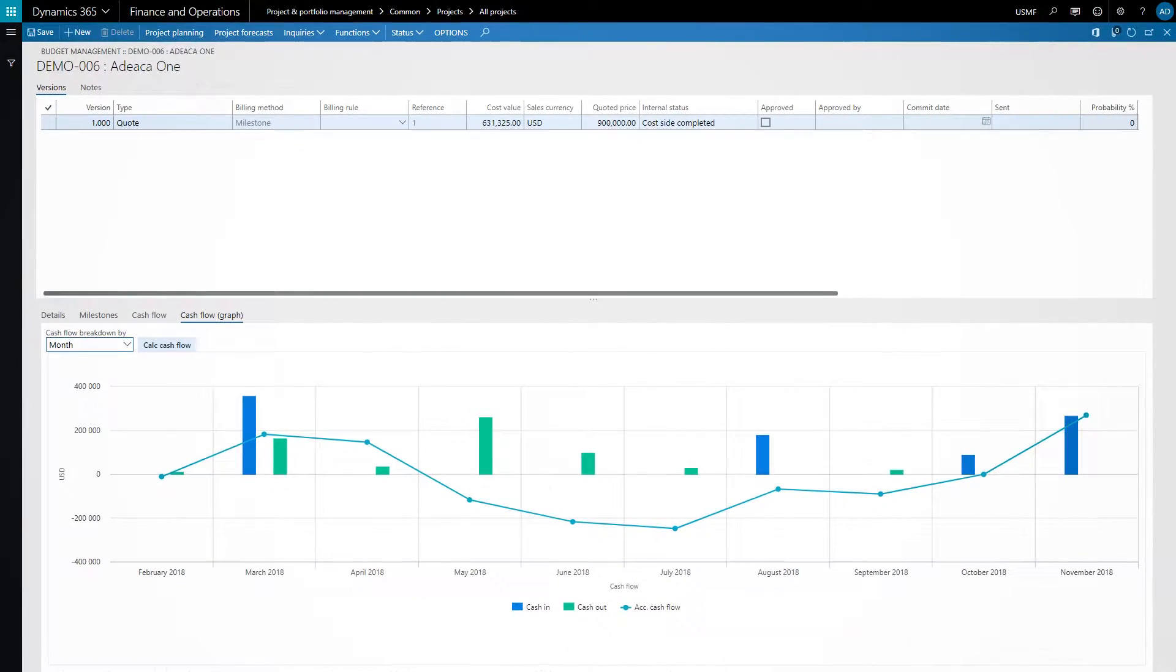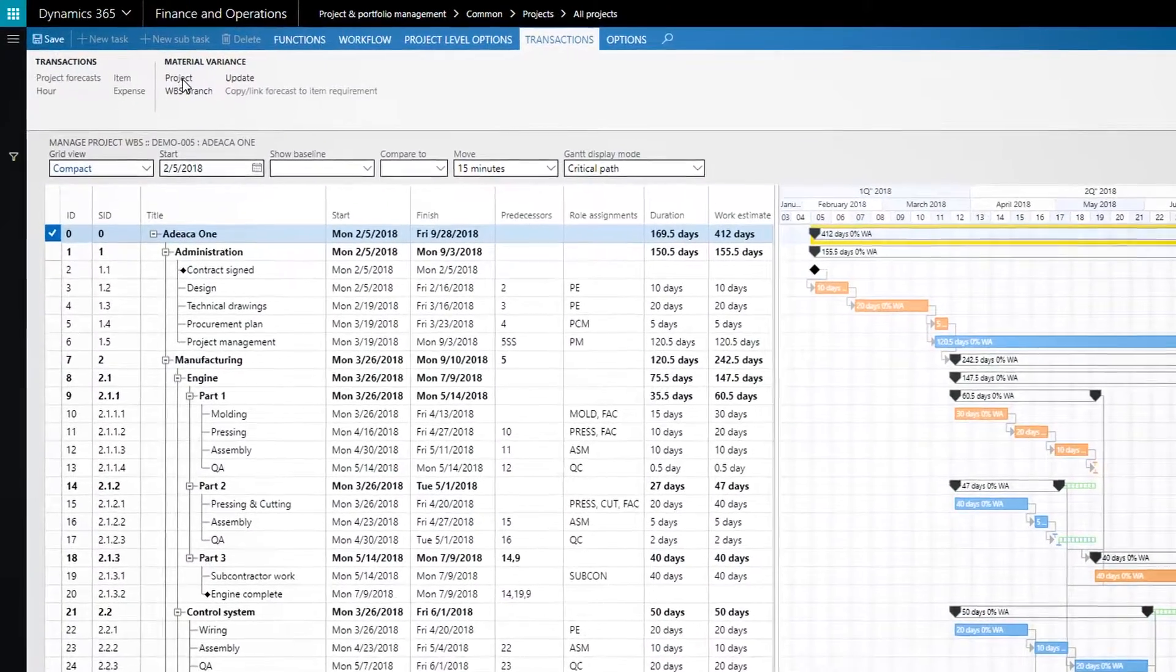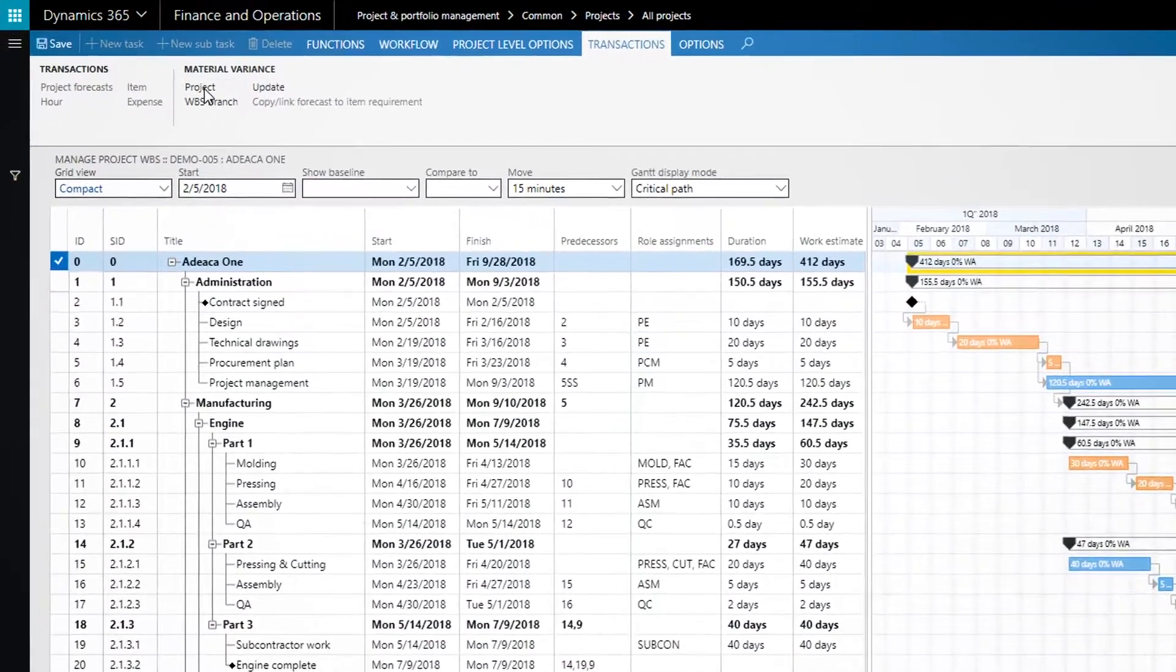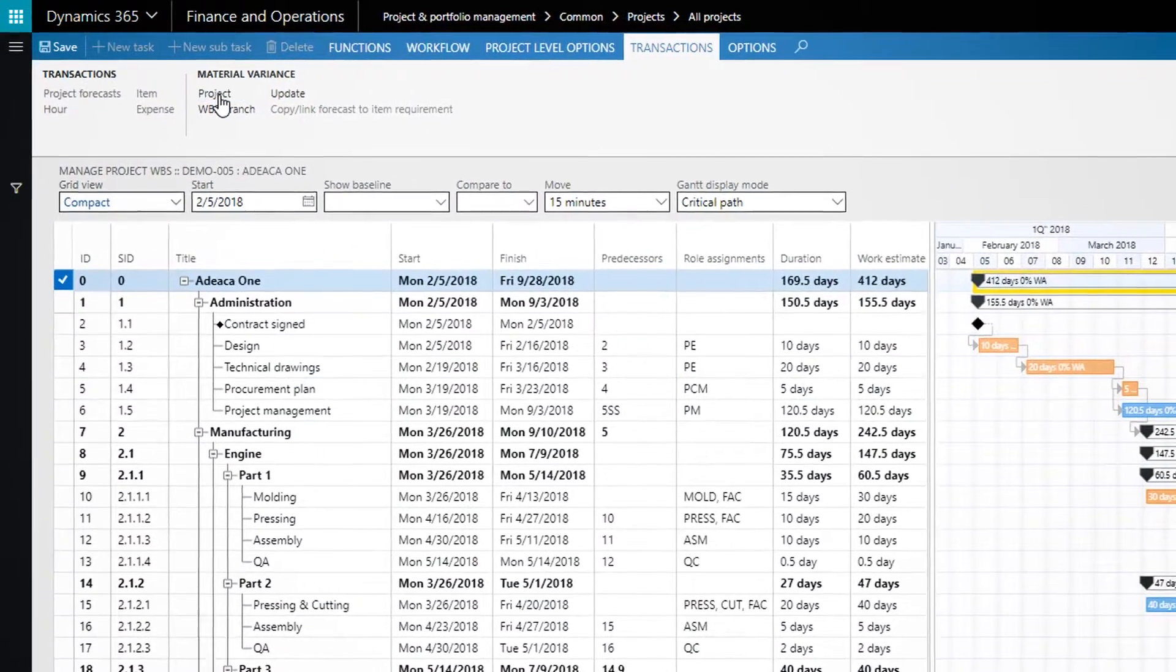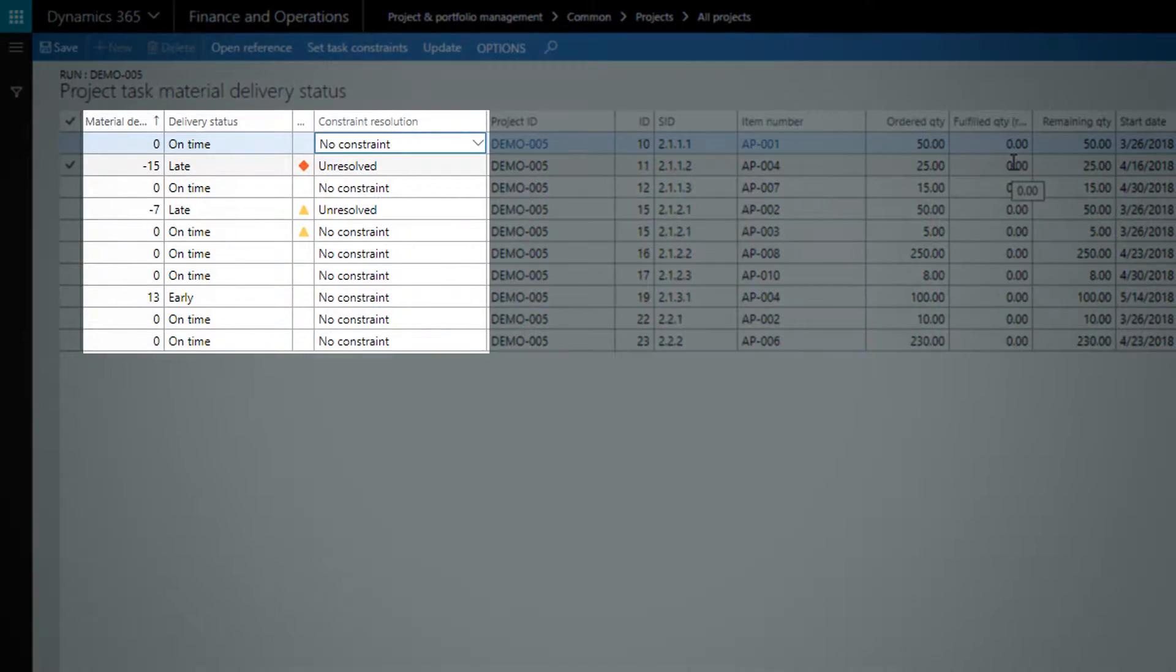The project timeline can also be directly applied to the MRP process, so the delivery schedule of purchase and production orders align with the project plan.